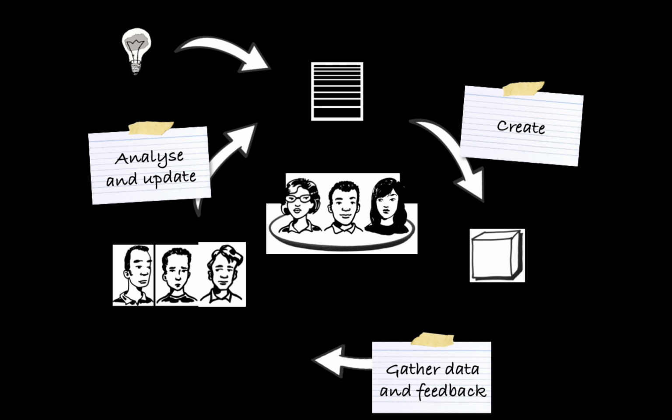You don't need to document everything. You do minimal documentation just for collaboration's sake. For example, the front end and the back end developers will generally need to have APIs documented for collaboration's sake, and that doesn't change very often. That's why it's being written down. Otherwise, for designs, instead of writing about designs or detailed requirements of our product, we just build it and go for it.